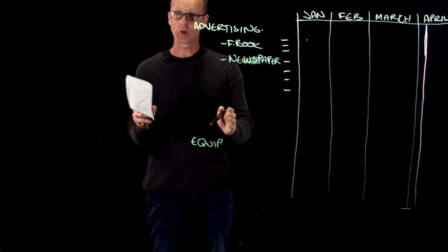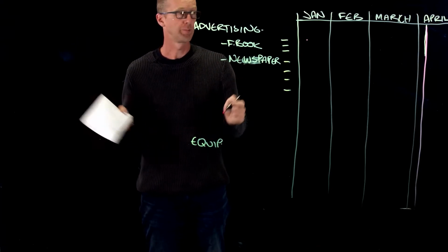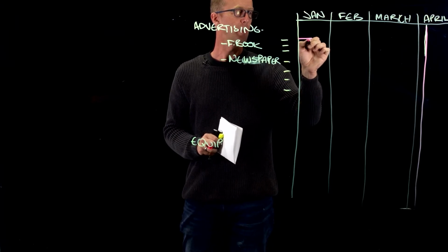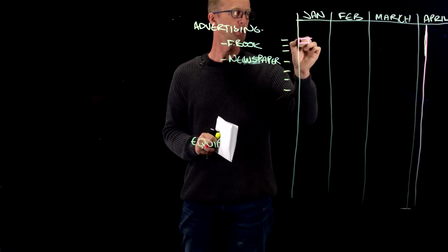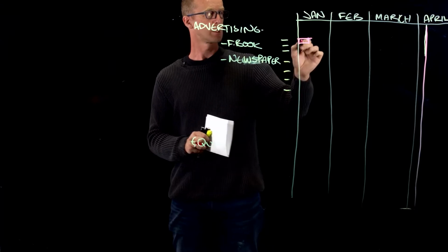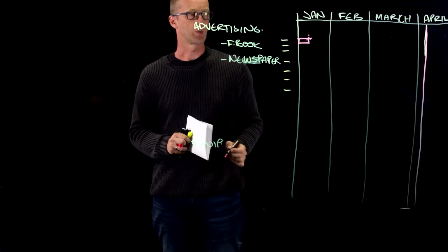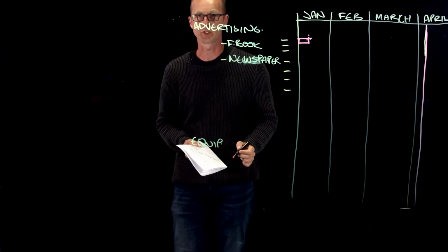And estimate how long that's going to take, and overestimate, right? So let's say that we reckon it's going to take a week, and basically you draw a band that's a week wide. So we go, okay, this work is going to start at the beginning of February and be finished at the end of the first week. Okay, so they're going to have that text written.